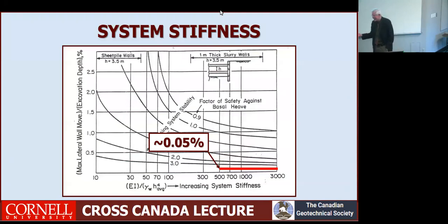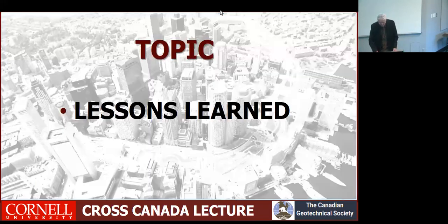Now, whether you want to stiffen things up to get that lowest strain depends upon if there's a structure that needs to be protected to that level, right? It's very expensive to do this. I would not say that I would do 85% coverage in the artery again. I think we could have gotten away with a lot less. We did when we went to Four Point Channel, but there we were lucky. We didn't cause any damage to structures because there weren't real structures next to us. We had the post office right next to us on Four Point Channel, and therefore we wouldn't have done 35%, but I don't think we would do 85 either. So the nice thing about this case history is it sets two bounds in terms of the performance.